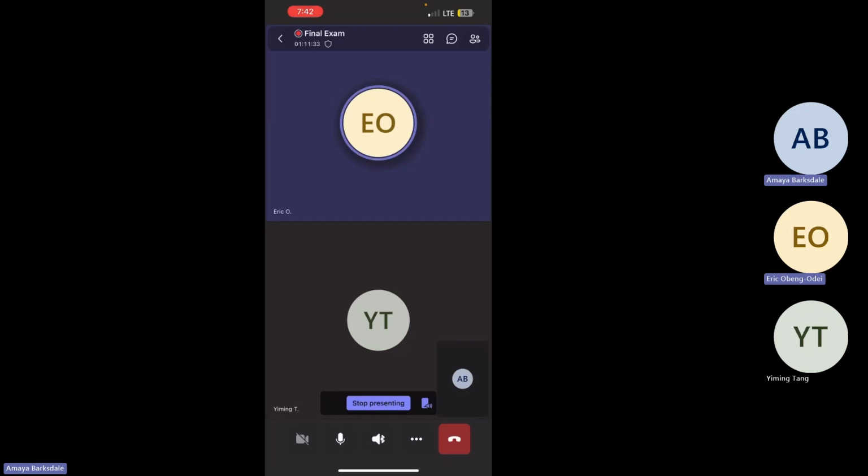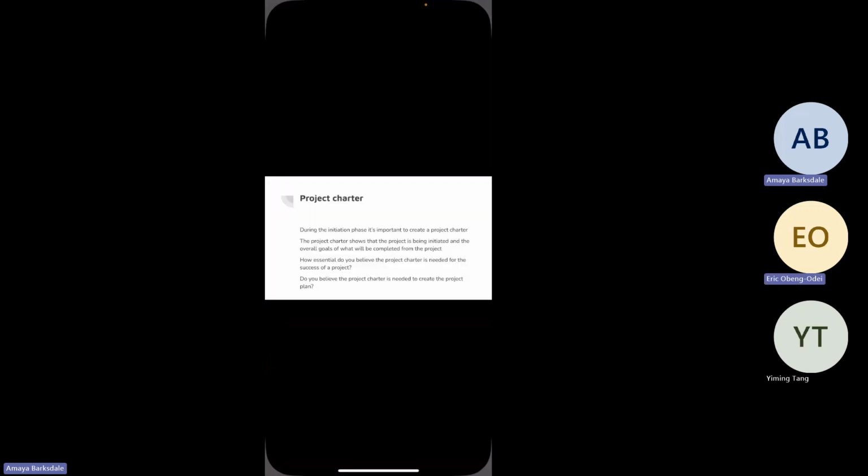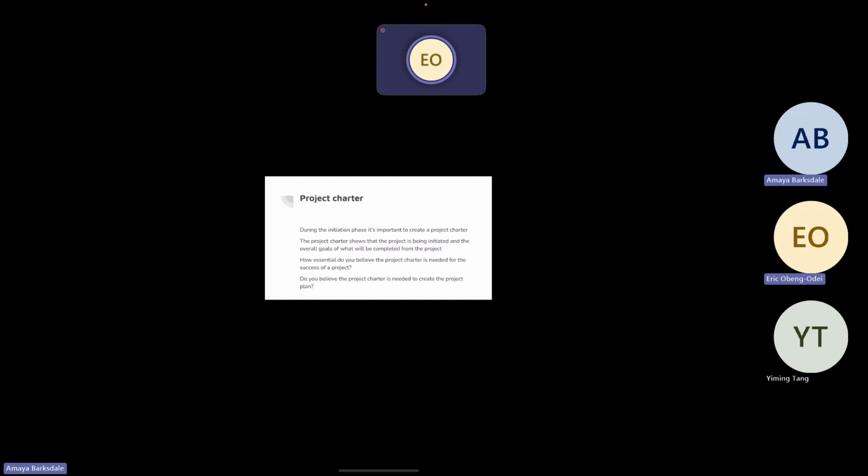And fortunately, the PM used a project charter and a schedule to let them know a team could get this task done within 4 weeks, but there could be plus or minus 2 weeks based on unforeseen situations. So I really think it's good to use this project charter when you are planning for your project, because that gives a clear picture and you get more insight and visibility into what you are doing. And I think it's really helpful.